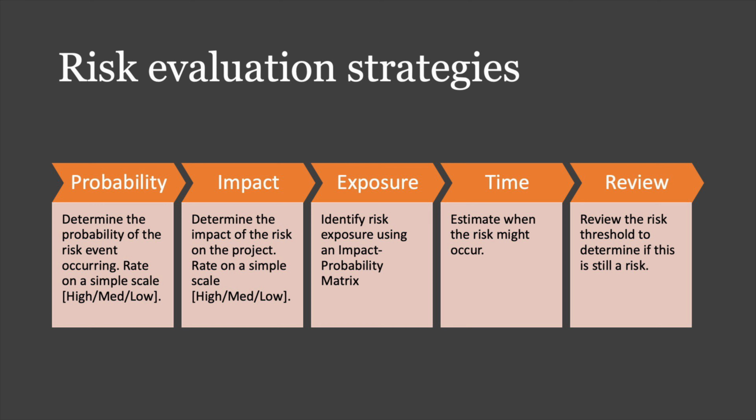Now next, you'll want to identify the impact. So if this risk occurs, how much of an impact is it going to have on the project? Is your entire project going to stop? If that's the case, I would say high. And if you'll barely notice this event happen in the overall project, or it's not going to shift any of your timelines, I would mark it as low. And then of course you can also have medium in that scale. I would recommend doing something along these lines.